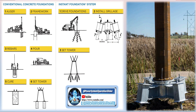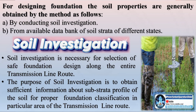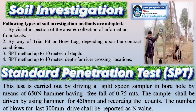Once these steps are completed, the preliminary route is selected and can then move forward to the detailed survey phase, which further refines the chosen path. The detailed survey is conducted immediately after the preliminary route has been selected and before the final route is approved. It is a critical step that involves gathering detailed, precise data about the terrain, topography, and potential obstacles along the selected route. The survey must be carried out early enough to allow for adjustments if significant challenges are discovered, but after the general route has been approved by stakeholders and regulatory bodies to ensure efficiency.